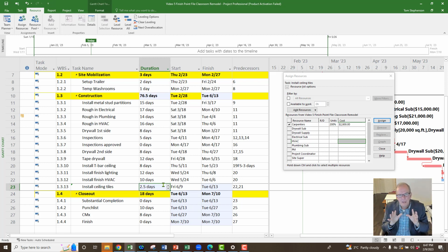But up to a point, it's not AI yet, right? So it's not calculating what's the space and how many carpenters can we fit in there. Because then I could say, oh, we'll add 4 carpenters, and then it'll take 1.25 days. Oh, then we'll add 8 carpenters, and it'll take 5 hours. It doesn't work that way. At a certain point, it's not being efficient anymore, and you got a bunch of carpenters looking at each other.